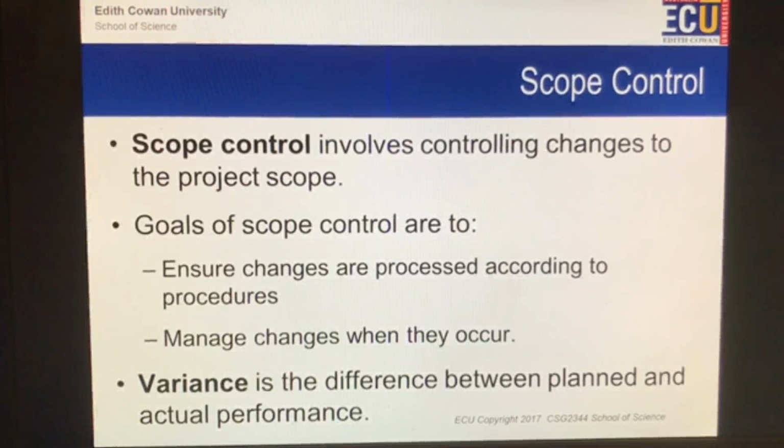However, if they do need to change, a good project manager will recognise this, but they'll make sure that the changes are signed off and verified. And so having that documented specifically in the scope, not just the scope statement, but in the work breakdown structure, is a very important thing. You'll hear the term variance used, because variance is the difference between what's initially planned and the actual performance that takes place. And project managers need to be able to demonstrate that if there is a large variance, that they have had sufficient sign-off, that they've had buy-in from the sponsor, that they've taken the correct steps to reduce that variance by as much as possible.